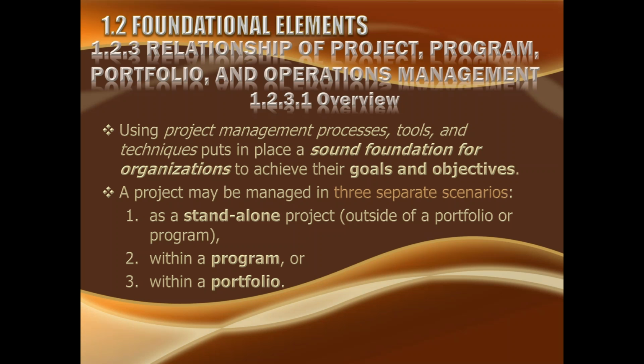Portfolio will decide the fate of the projects and programs from the point of view of assigning priority and resources to them. So overall funding for the projects and programs will be decided by the portfolio. Portfolio will have the budget for all the projects and programs, and it will decide which project or program should continue and which should be closed down just because of financial constraints.